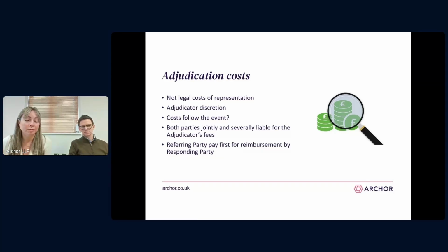One point that's really important to remember with adjudicators' costs is that the parties are jointly and severally liable for these fees. So even if the adjudicator decides that the responding party must pay 100%, ultimately, if the responding party doesn't pay that, the adjudicator can sue the referring party or the responding party or both to recover those fees.